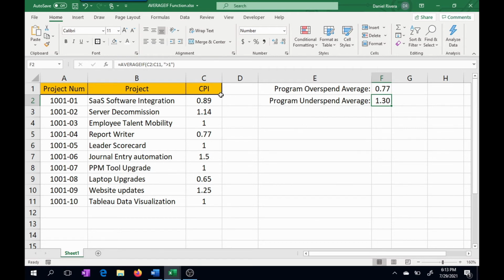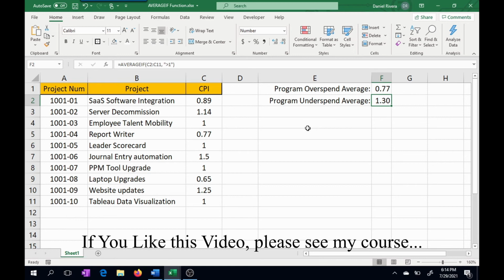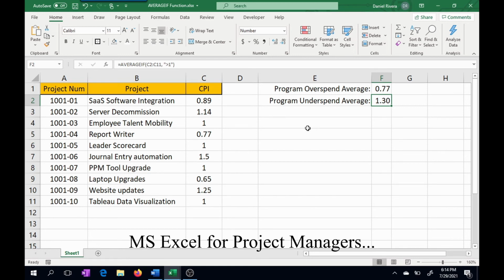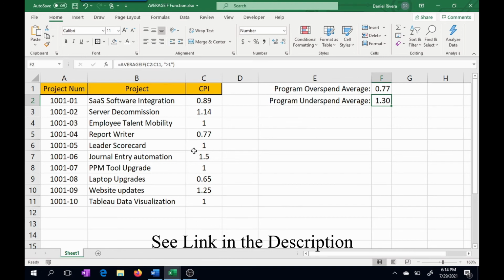And from here, once you have your overspend or underspend, and depending on the investigation you want to do, you can start investigating which specific projects are causing the problem and reach out to the associated project manager of those projects. The same system is applied to underspend, because if a program is underspending and doesn't need the extra money, this extra money can be given back to the organization to fund other programs looking for extra money. Then it can be investigated with the project managers as to why the estimations were so high.